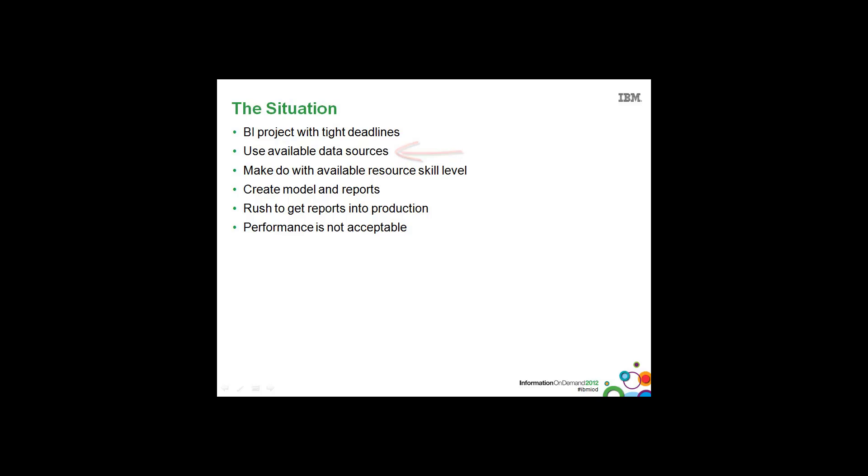Modelers end up using the available data sources because there's no time to create data marts or data warehouses. The project management team will make do with the available resource skill level. So there may be inexperienced people working with Framework Manager or Report Studio. They create the model and the reports. They rush to get these reports into production and performance is not acceptable.